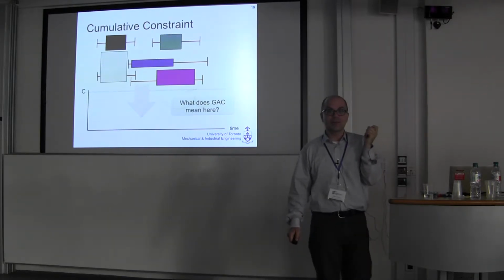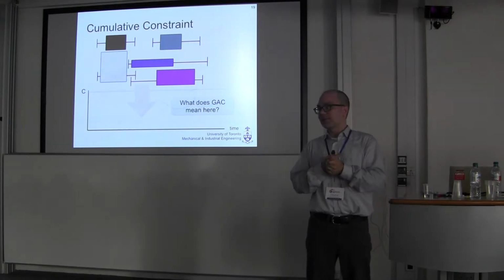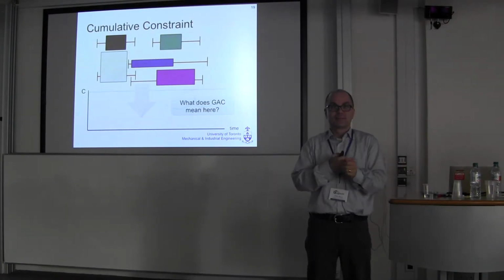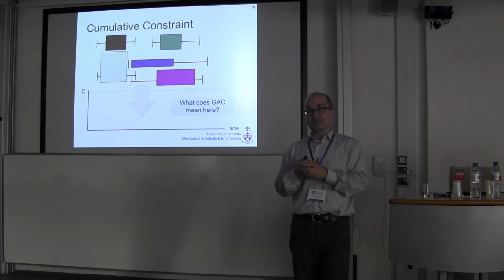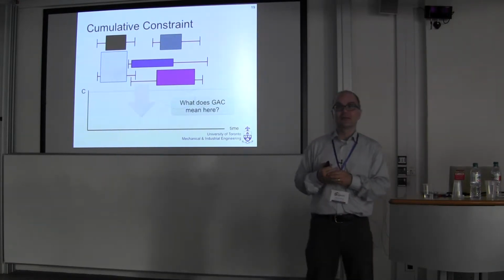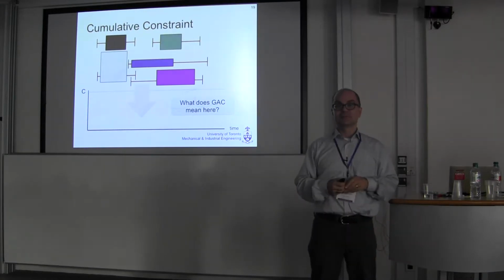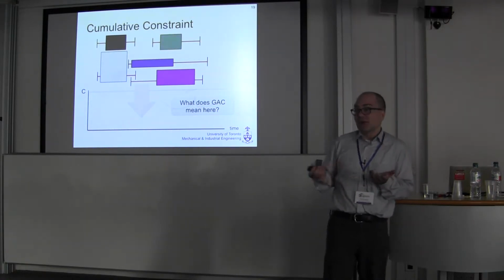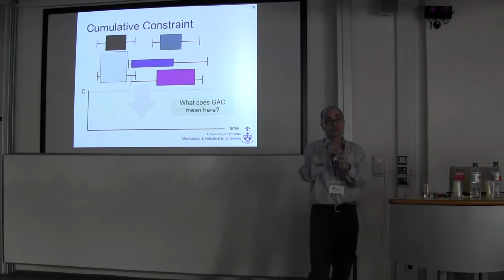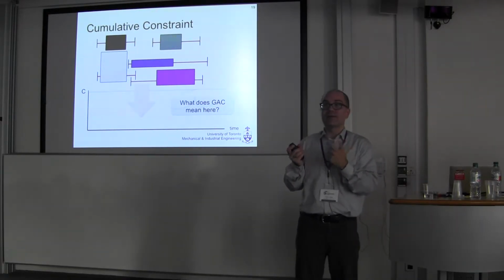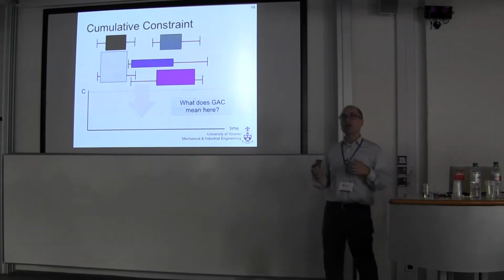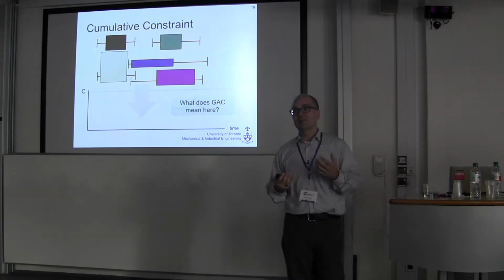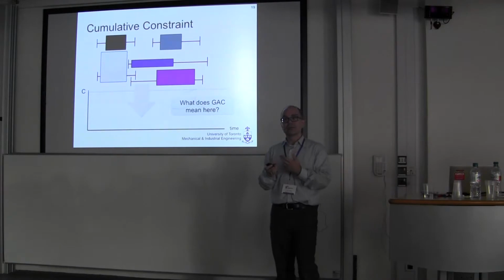So think about the job shop scheduling problem and the solution to a job shop scheduling problem. What did I say a solution to a job shop scheduling problem was? The order of activities. So if that's the solution, what do you want our variable to be? You could introduce a variable for every pair that specifies their sequence. Xij equals 1 if i is before j, Xij equals 0 otherwise. So if this were a disjunctive resource, we might want to represent it not as start time, but as a sequencing or ordering variable.